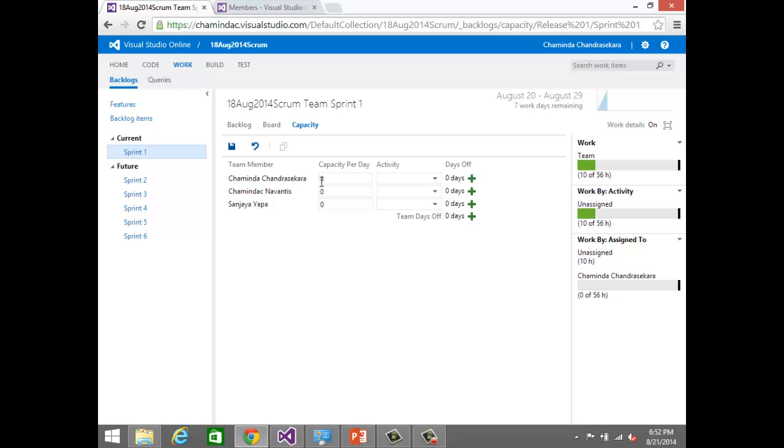Normally, people use this issue work item again in a bad way to raise bugs, right? So then they expect it to be resolved. So it cannot be resolved. Why? It is used in a different context. So remember, issue is for actually handling things that are affecting the development team, not the client. The client can't raise issues, right? This is a planning tool for the development team, not for the client, right? So this tool supports the development team's requirements, not the client's. Okay, clients are given certain information, but it's not for the client's planning. It is for the planning of the development team, right?